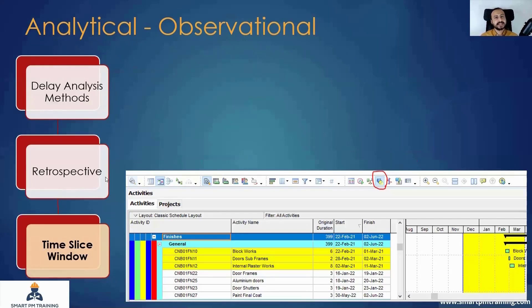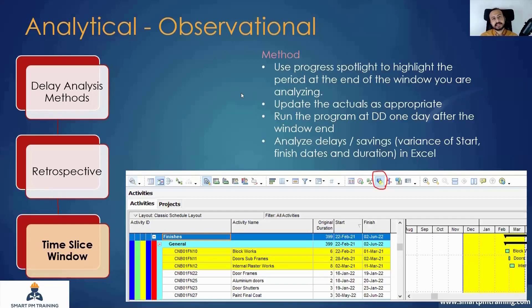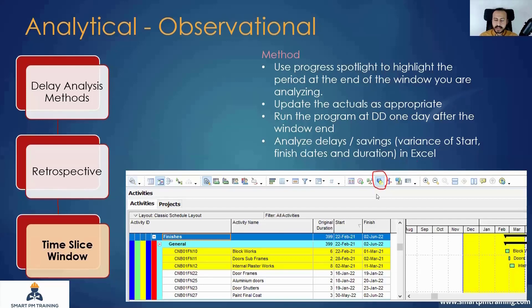These definitions, by the way, are as per AACE Forensic Schedule Analysis 29R-03 — maybe one of the best practices about forensic schedule analysis and delay analysis. It's very powerful and reliable, and many practitioners now trust it. It's a window analysis. For example, for the first window, I'll use the baseline schedule. The first window runs from 1st of December, which is the project start, until end of March, which is the end of the window — to show the planned work within this period as a baseline program.